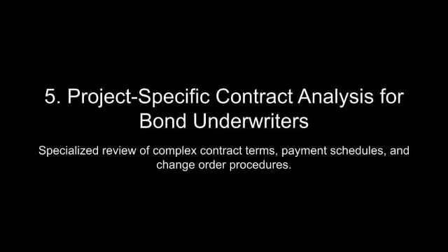Litigation, the most formal and adversarial dispute resolution method, involves resolving disputes through the court system. While litigation provides a comprehensive framework for evidence gathering, cross-examination, and appellate review, it is often criticized for its high costs and extended timelines. For bond claims, litigation can be particularly burdensome, as it may delay project completion and increase the financial exposure of all parties involved. Sureties must be prepared for the possibility of protracted legal battles, especially in cases where jurisdictional challenges or conflicting contractual provisions arise.